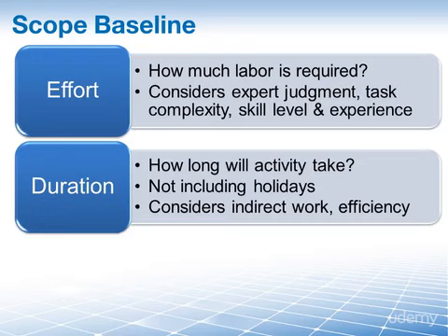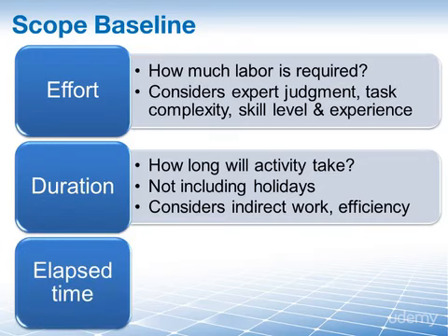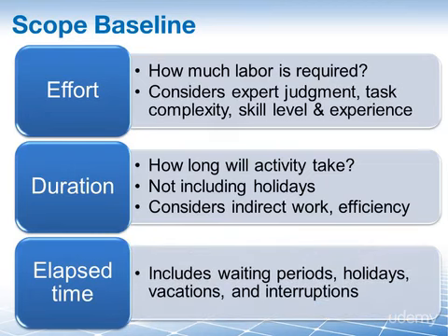And on top of that, we have the elapsed time. Under elapsed time, we include waiting periods, and because these people sometimes have to go on holidays or go on vacation and have other interruptions.